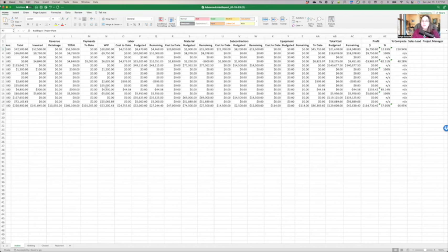So on this particular report, keep in mind if you're using this as a WIP report that the WIP amount that is in column N here on this report is as of the day that you pulled this report. So there's no way to manipulate this particular report within Knowify and say I need to see prior WIP information. But as of the day that you pull this report, you can see your overs and unders and where you're at on billing, if that's important to you to know a percentage of completion WIP number.